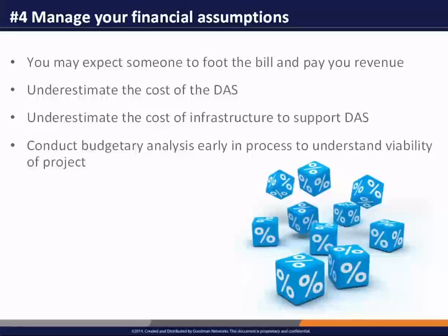So the way around all of this and to get the right assumptions up front is to try to conduct a budgetary analysis very early in the process to understand how viable this project is. And a system integrator or your consultant can look at what you're trying to accomplish and give you some budgetary ideas as to what this is going to cost and the financial considerations.